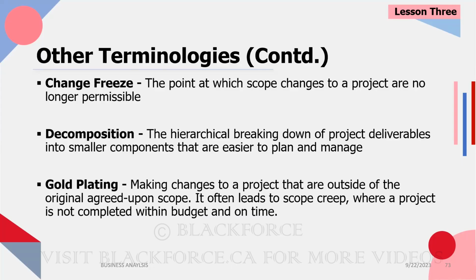What is gold plating? Making changes to a project that are outside the original agreed upon scope. Okay? There is a difference between gold plating and scope creep. Scope creep is when, and maybe I'll clean this up a bit so that you're not misled when you're reading it, scope creep is when the business is asking for more than what was agreed upon. So we have a fixed time, fixed amount of money, right? And we've agreed to do these 100 user stories. If the business is coming to then add 10 more user stories to it, that may be scope creep, right? Chances are it is scope creep.